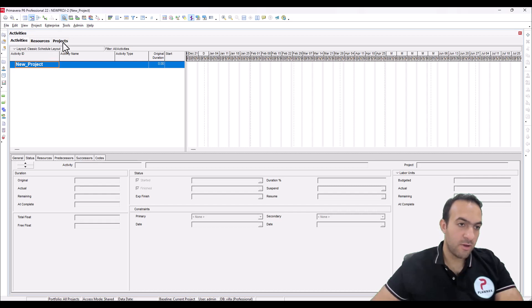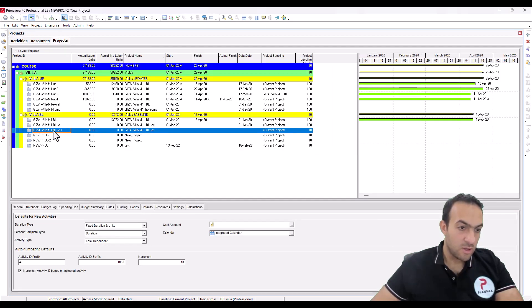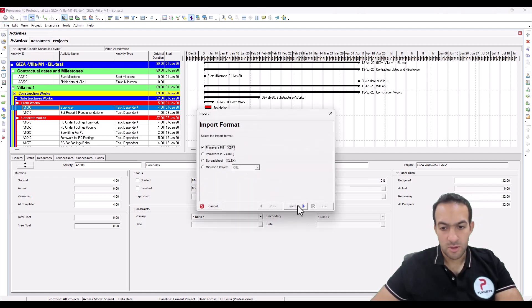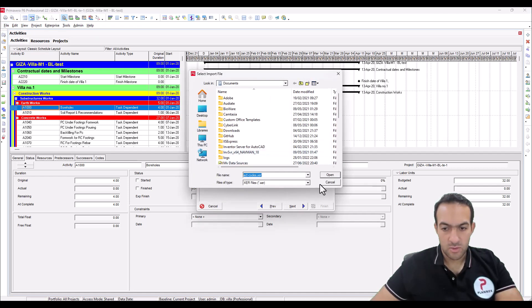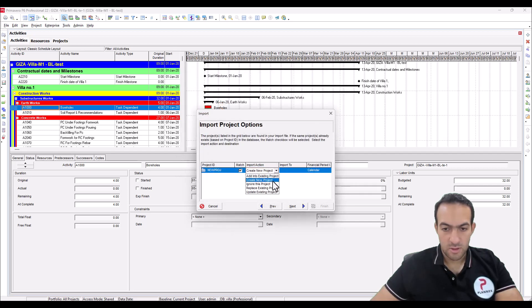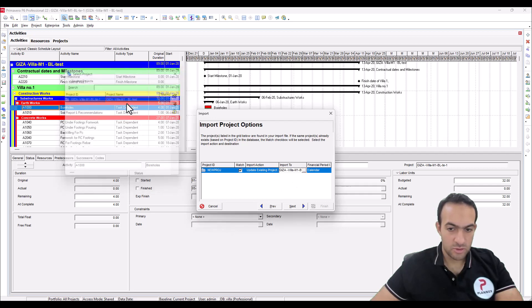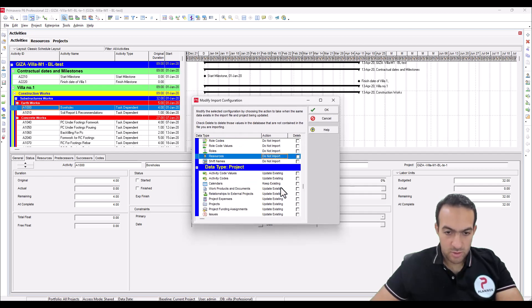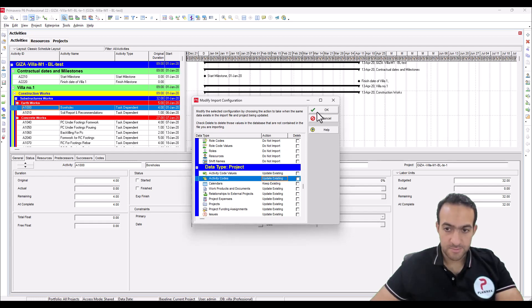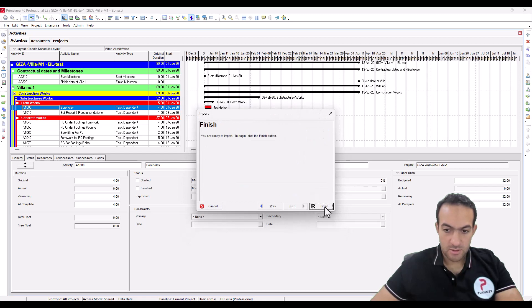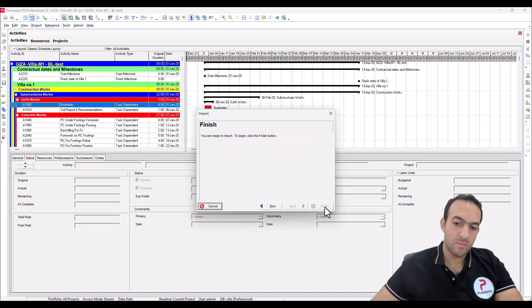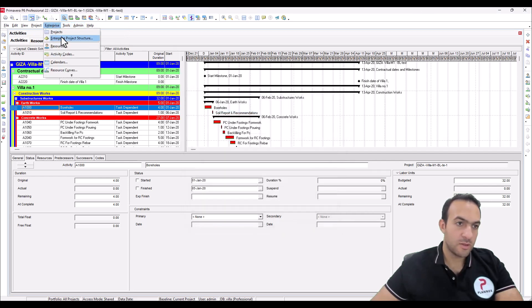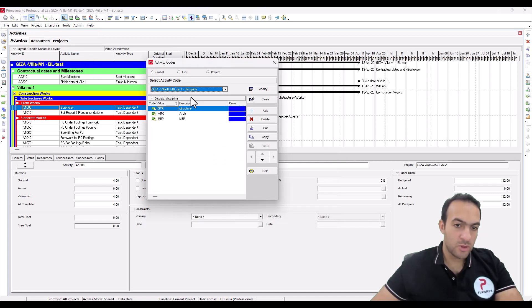Someone asked: what if I want to import this code into one of the already existing projects? Then go to Import, select the XCR codes file, next. Here choose 'update existing project', select the project, next. Make sure this is set to 'don't import', and in the activity code set to 'update existing'. Next, finish.